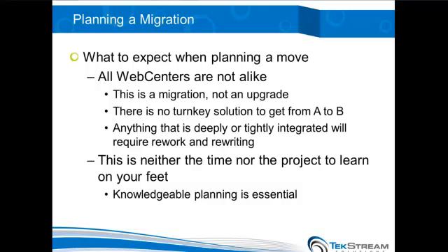There's not a run-this-script-and-all-of-a-sudden-everything-comes-up-and-gets-going. It's an entirely different infrastructure. The code base is different. The integrations: there are some that are similar, which we'll talk about as we go. There are some that are easy to make that move from one to the other. But just as with any other scenario, anything that you've got that is very deeply integrated or tightly integrated, you're going to have to rework and you're going to have to do some rewriting. And it's important to know that and to take that into account up front.